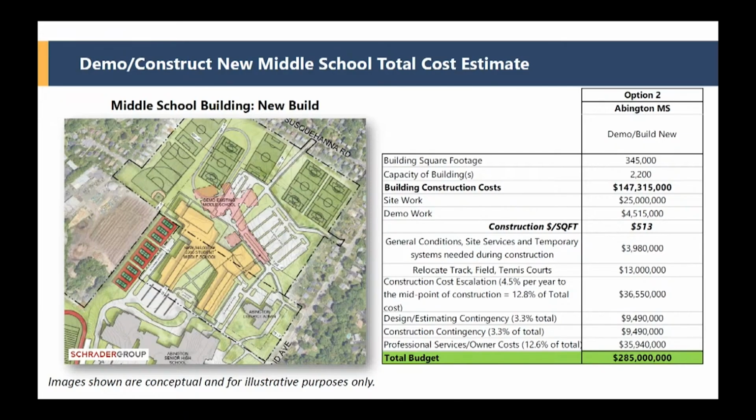Great, thank you. Just giving a little context to some of these numbers. Now, when we work through the estimate, I'll just point to different things. Remember David was talking about 345,000 square feet. So that's the number we're using. When you look at mechanical, electrical, plumbing, and general trade costs, this equates to about $147 million. There is site work for this consolidated lot, and it's going to be a little more than if it was just a plain lot, because this site is older. It was built quite a while ago, and did not have as many stormwater and erosion control requirements at the time.